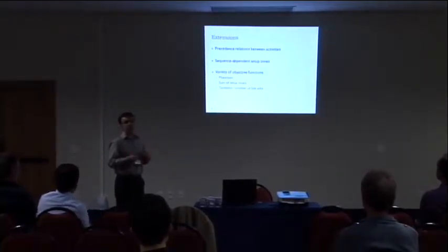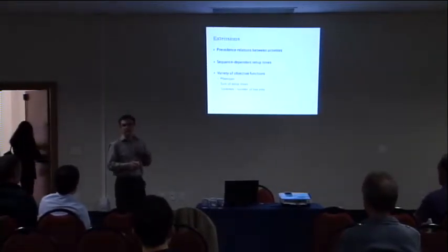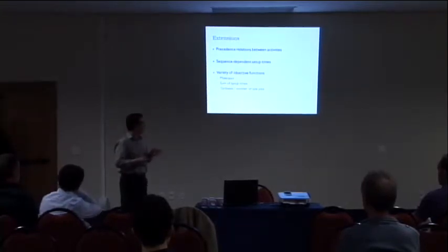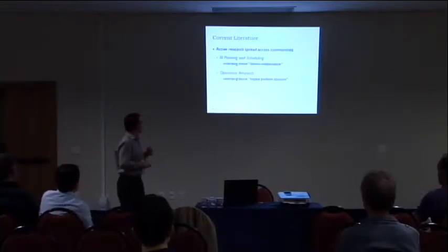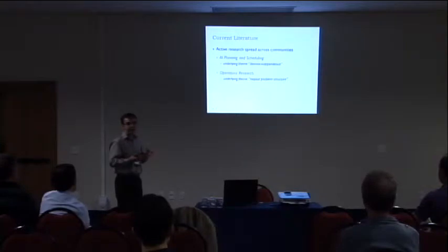And you may consider a variety of objective functions. You may want to minimize makespan, the sum of setup times. If your deadline is not a hard constraint, you may want to minimize the tardiness, number of late jobs, and so on. Okay? And as you imagine, there's a huge amount of work already in this area.